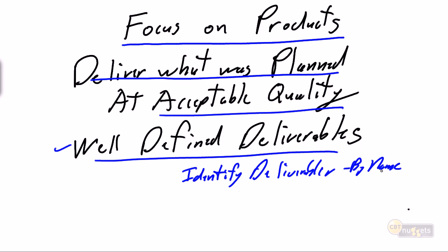But if all you're doing is saying, I'm going to do a current situation analysis deliverable, does that truly explain what it is? Well, it gives us the concept of what the current situation analysis deliverable is going to be. But is there some room for ambiguity? Is there some room for expectations management or expectations run away? I think absolutely. So now we may want to deliver the table of contents, the TOC, for that deliverable.